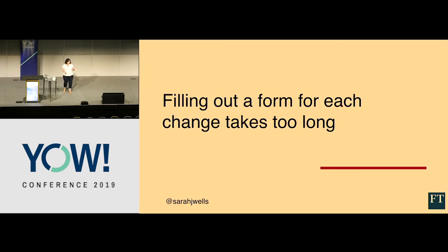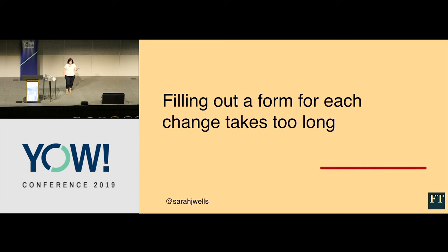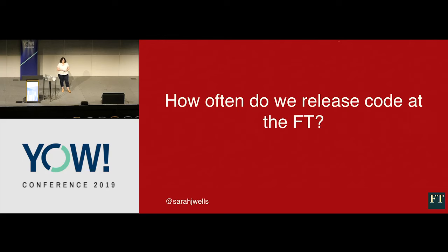The second process change: we used to fill out a form in Salesforce for every change request — normal changes required someone else to sign off, but of course they'd just trust their developer friend. It's process theater; the real way we review changes is a code review, a PR. When we built our first microservice system, we did more than 2,000 releases in a year, and I calculated it would have taken 47 working days just to fill out change request forms — that is not a good use of anyone's time. So now we have a change API: you call it as part of the build pipeline, we still know when a change has been made, but without the coordination overhead. So how often do we actually release? We know because I can graph the calls to the change API.